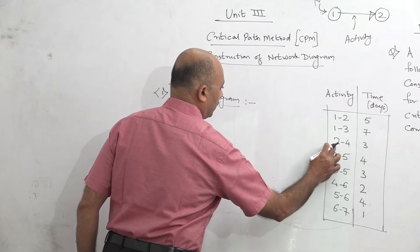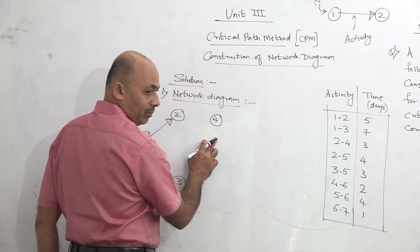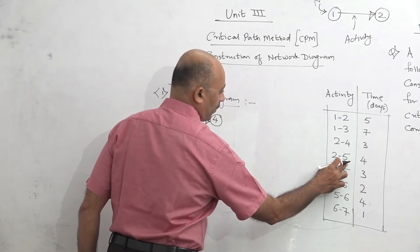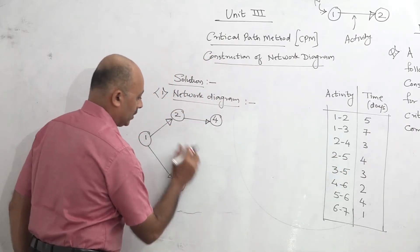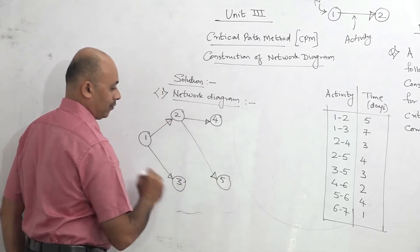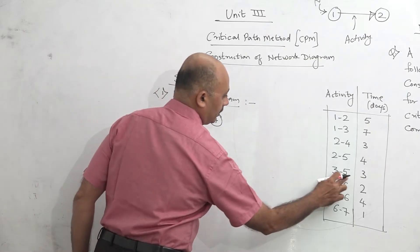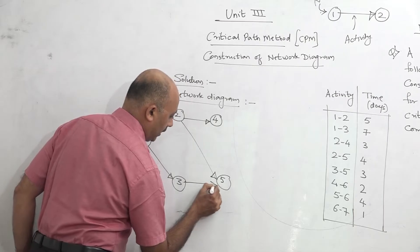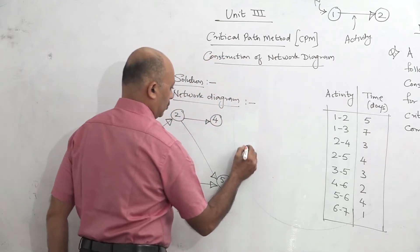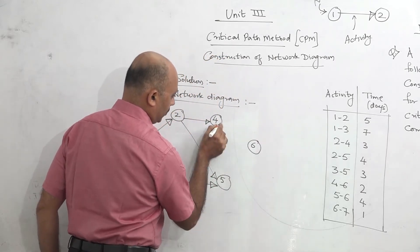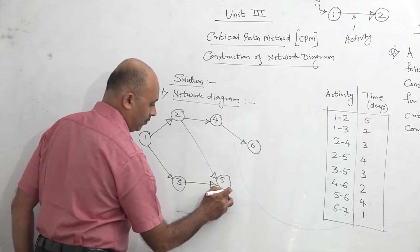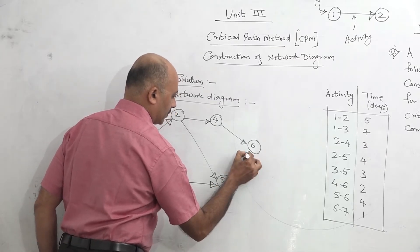From event 2, there is activity 2-4. So we draw event number 4 and join it — this is activity 2-4. The next activity is 2-5, also starting from event number 2. We take event number 5 and join it — this is activity 2-5. Then the next activity is 3-5, so from 3 to 5 we join this — activity 3-5. Then next is 4-6: we take event number 6 and join — activity 4-6. Then 5-6: from 5 to 6 we join — activity 5-6.